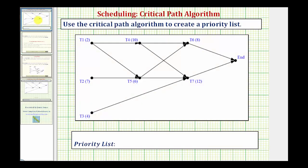Looking at our digraph, the completion times for each task are in parentheses — let's assume they're in hours. We're looking for the longest path in the digraph, which will be our critical path. Notice how if we start at task one and go from task one to task four, to task six to the end, that would take two plus ten plus eight, or 20 hours.